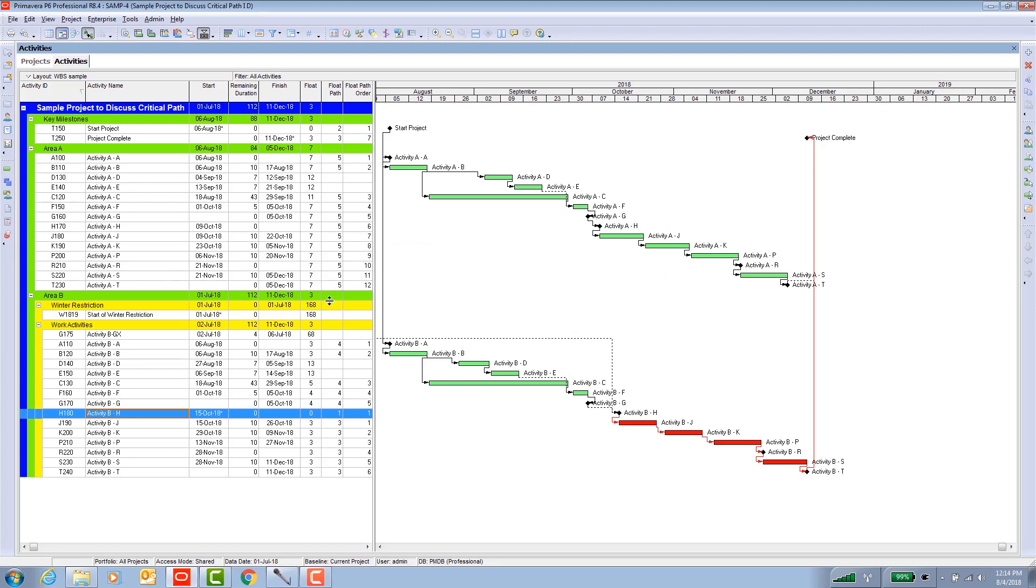Now these two columns have been populated. This column is float path number and this column is float path order. In other words, for a given float path, for float path five for example, it has the fifth most critical float. It shows you the order which is self-explanatory.